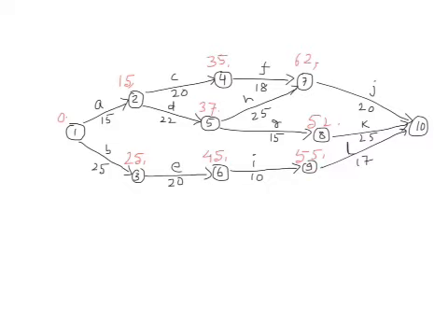So out of the three we will again take the highest. So the earliest time on node 10 is 82. Now project is considered to be complete only when all the activities are over, and that can happen earliest in 82 days. So project completion time is 82.